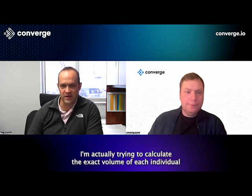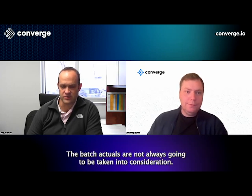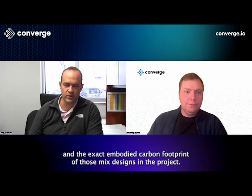anytime you can take that level of work off my desk, where you've got multiple Excels open, where I'm trying to calculate the exact volume of each individual mix design, and then trying to compare that back to batch actuals. The batch actuals are not always going to be taken into consideration. However, in this particular case, utilizing something like Data Hub, I'd have the batch actuals, I'd have everything already entered, and I would know down to the pound the exact materials I used and the exact embodied carbon footprint of those mix designs in the project. And then all I have to worry about is my transportation costs or material costs, and go from there.